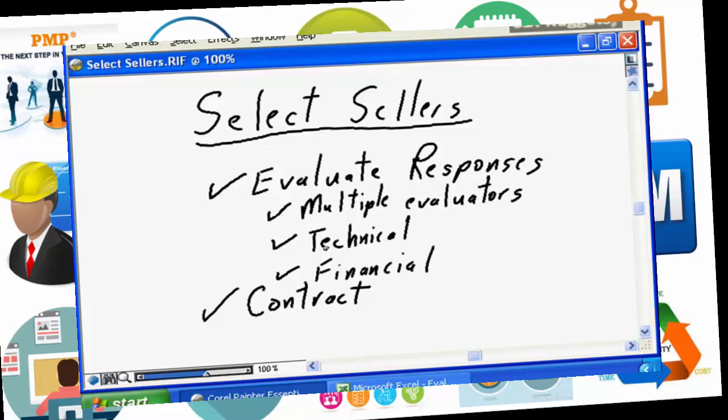The statement of work comes back to the vendor's statement of their technical solution and how their technical solution is going to satisfy your request, i.e. the scope defined by you to satisfy your project requirements. The statement of work ideally would be a straight carbon copy of the scope statement going into the procurement process, but often when the vendor does not have full compliance to all of your requests, you will need to modify the scope statement so that the vendor is then bound to deliver based on the modified statement of requirements, based on the modified scope, to ensure that you're dealing with all of the issues that the vendor can satisfy for your project, and that you, the project manager, understand how the vendor is going to address that.